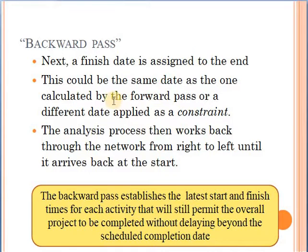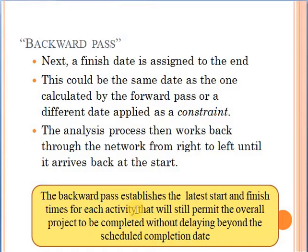In this condition, the contract will put a constraint on you — this is the case where you have a constraint on the finishing date of the project. If you have no constraints, then you can begin the backward pass calculations with the completion time of the project that you got from the forward pass calculations. We'll go from right to left, and with this method we'll be establishing the latest start and the latest finish of each activity, such that we do not delay the completion time of the project.